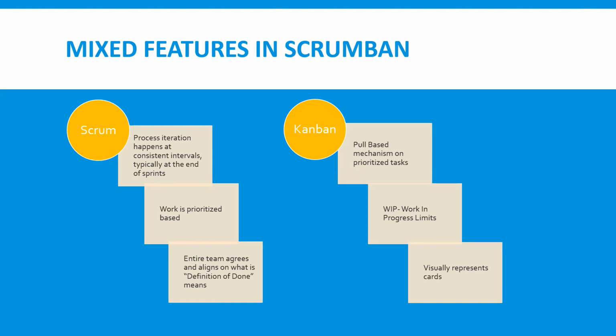But normally we will follow one limit, where the work in progress, called WIP, is one of the key metrics for Kanban to identify work in progress on the dashboard or visual board. There should be some limit on how many stories each team member can take and have under development.